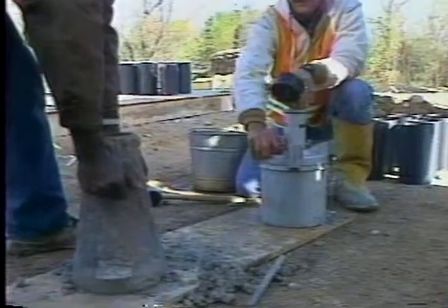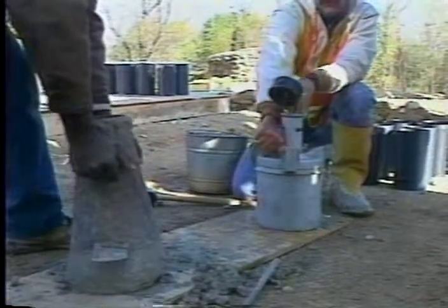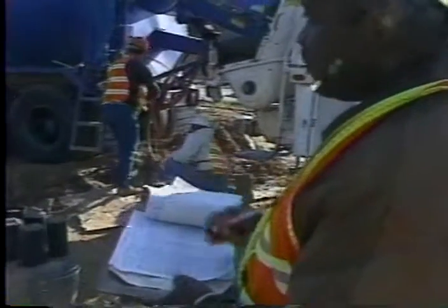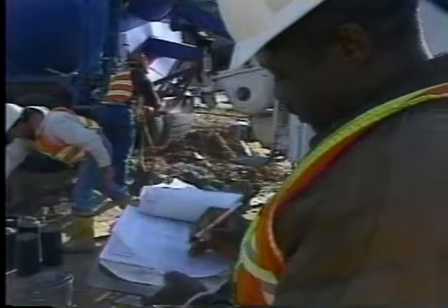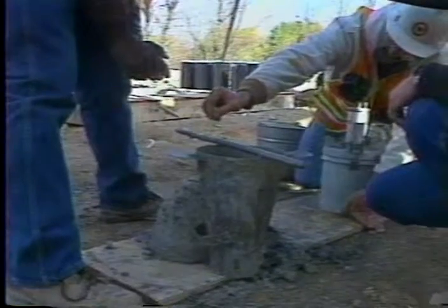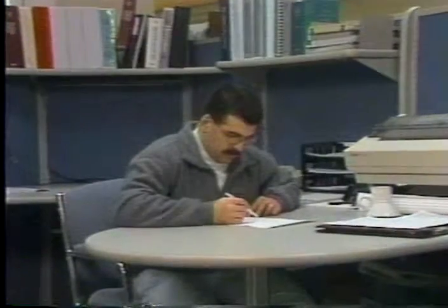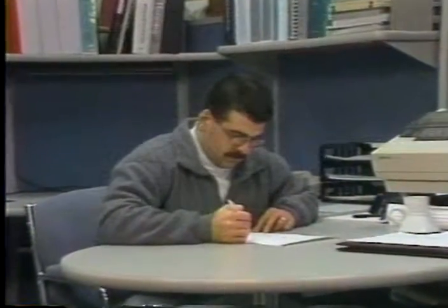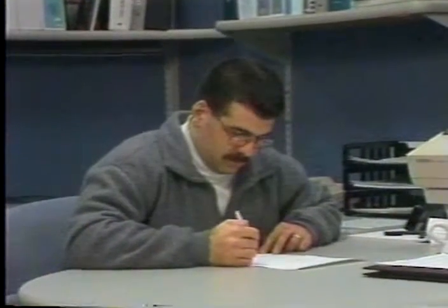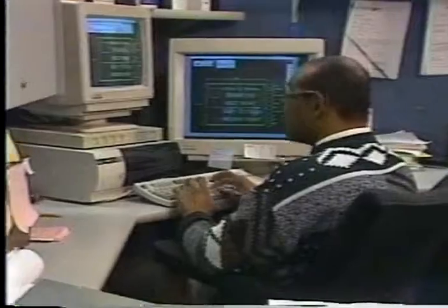In this program, we have covered development of contract staffing guidelines and planning values. Staffing guidelines are important. They are used in establishing standard planning values and in assigning personnel to field contracts. For the best utilization of available personnel, each contract staff should be made up of the smallest number of personnel that ensures quality construction. Each agency should modify the maximum staffing guidelines to fit its own work methods.